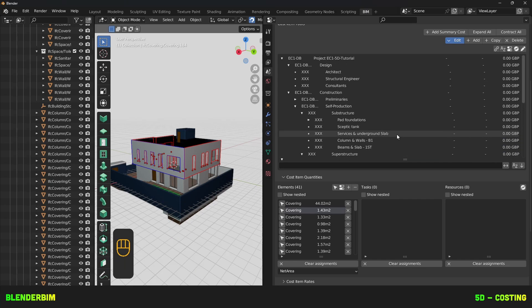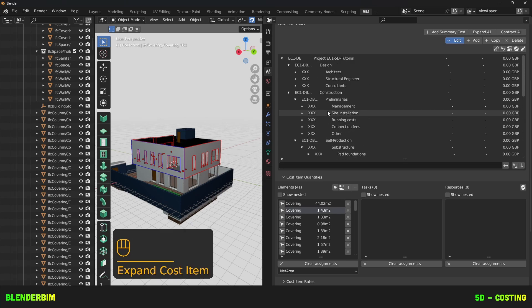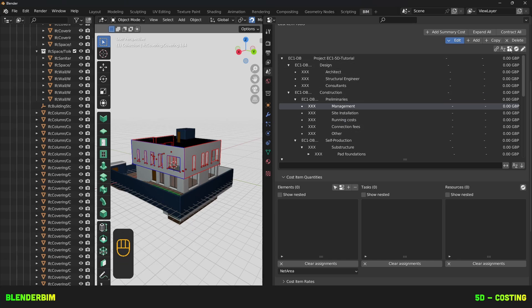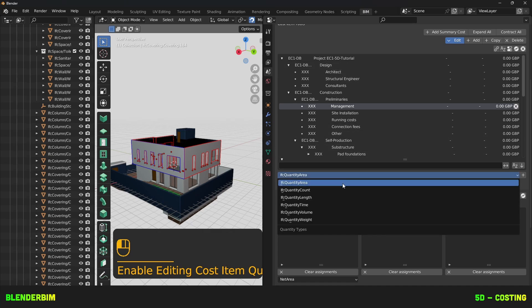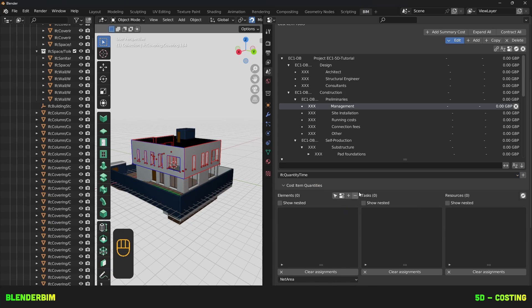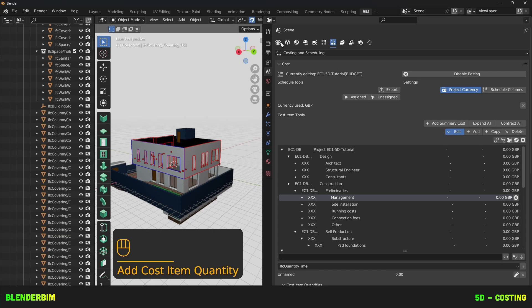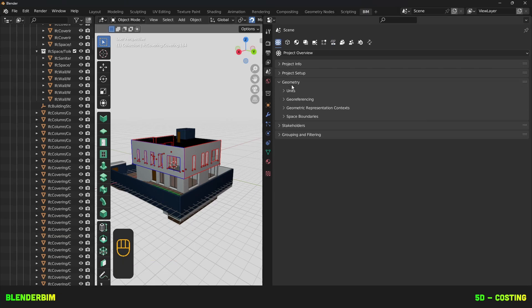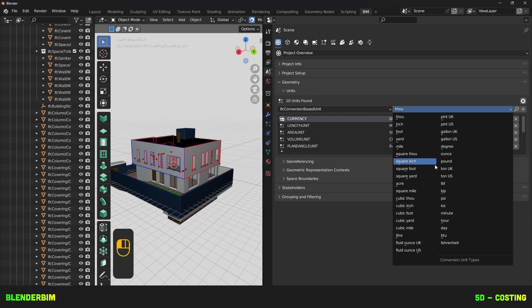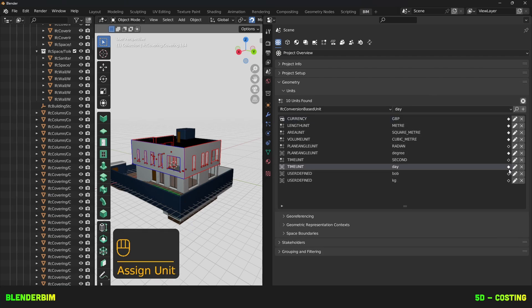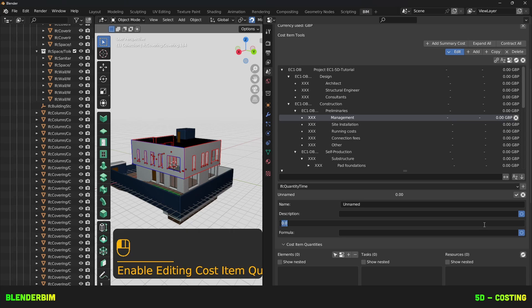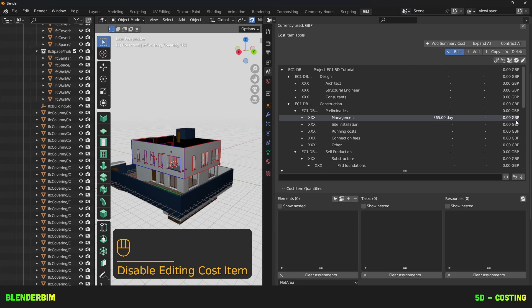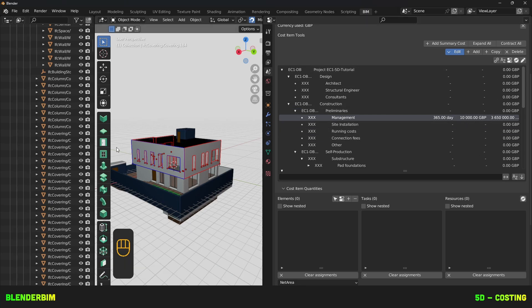So now let's look at how to create a manual quantity. We'll look at preliminaries here, and management. So now we'll press on this property like icon, and we'll look for a quantity type we can give. I'll choose quantity time here, and I'll press on plus. I happen to have a unit in my project. Go to geometry, units, and here you can add an IFC conversion based unit for days, minutes, hours, whatever. I'll use days, I already have it. Press on plus. Then once you got it, press here to make it the default unit. And when we add a certain value for this quantity time of, let's say 365 days, press OK. We'll see it has shown under the quantity column. I've given it an arbitrary cost of 10,000 pounds.